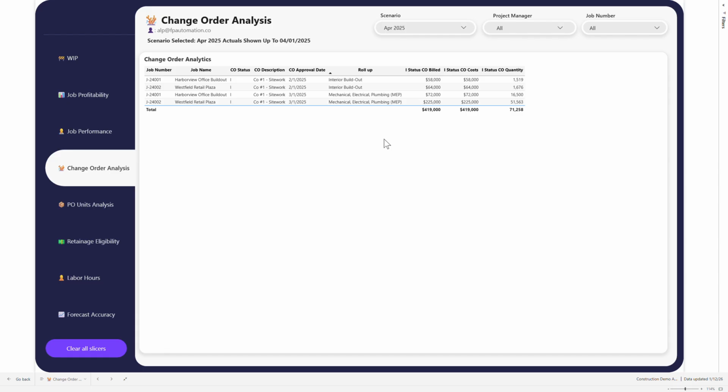But because jobs tend to be cash flow intensive, it's important that you collect as early as possible and approve change orders as early as possible in order to avoid these uncomfortable conversations, and potential conversations that may lead to the client arguing or claiming that they don't necessarily need to pay for these particular change orders.